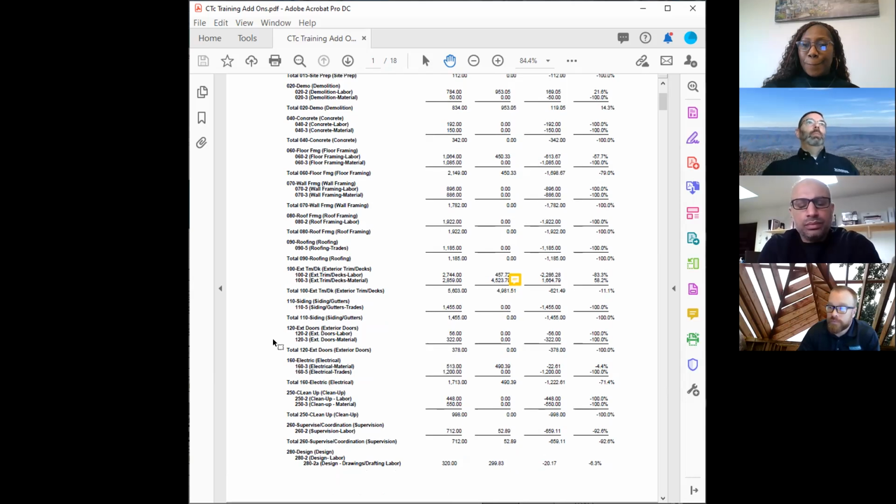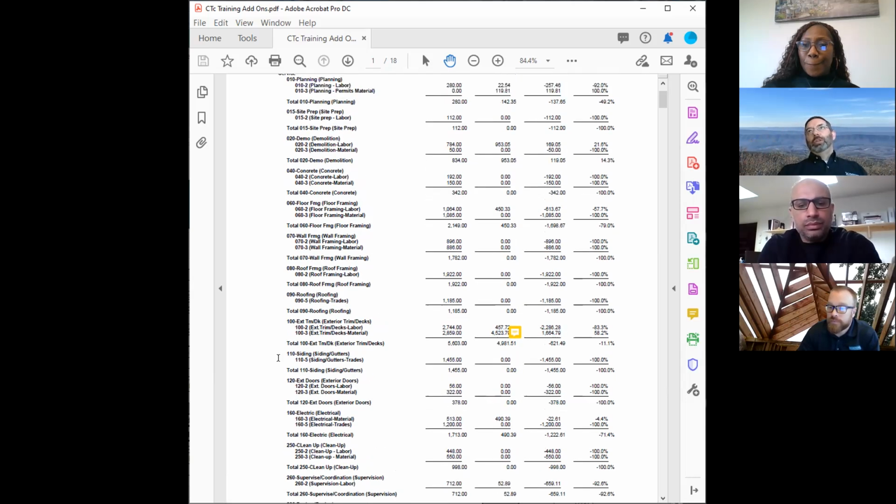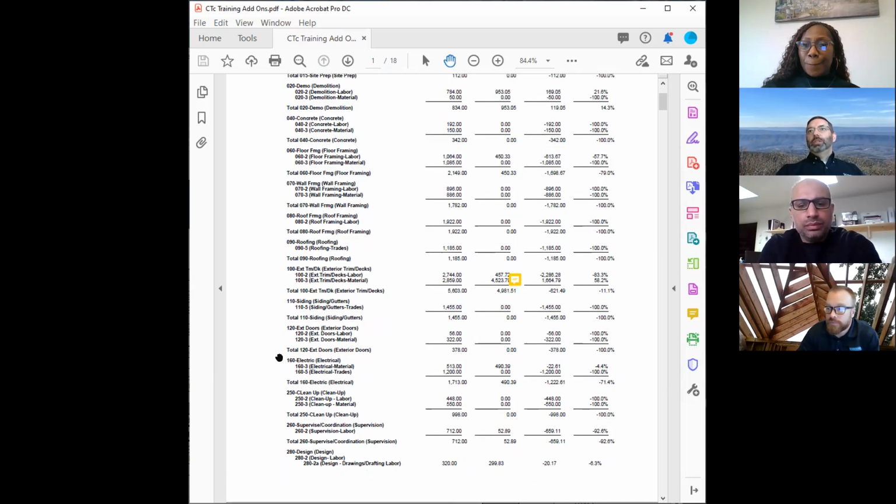Okay. Other things that we want to look for on a job cost report. To Jack's point, we want to look for obvious over and under budget categories. So again, this one stuck out to Salima because it was so far over, at which point she went and looked at it and made the assessment: is it a coding error or do I have an issue?